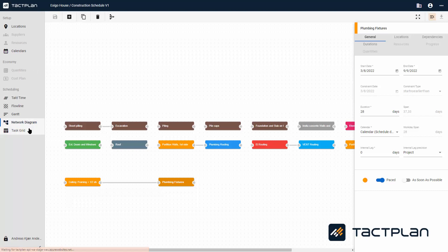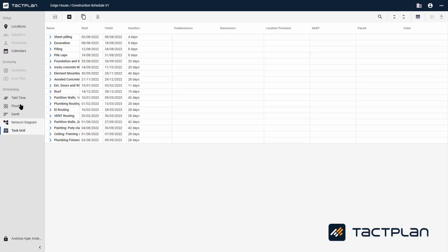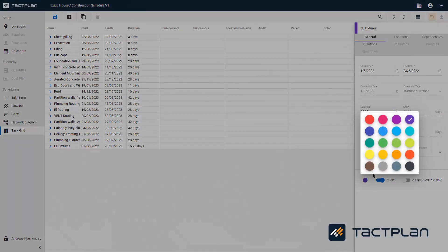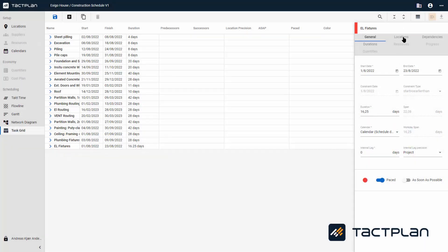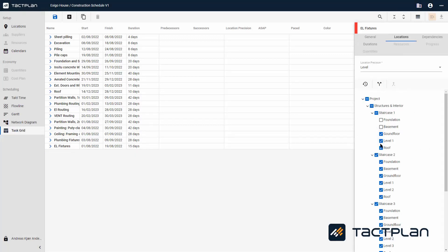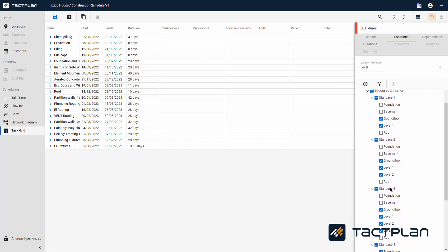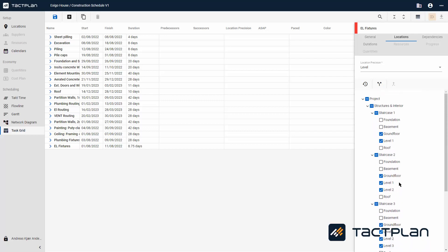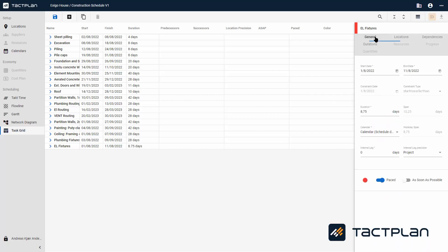We now go to Task Grid. Task Grid is a table view of your whole schedule. Here you can also add tasks. To add a task in the Task Grid, click Add Task. The task shows alongside with the side menu where you type in the name and also choose the color. The task shows at all locations, and just like the other views, you can deselect the locations where the task is not to be made. Then you go back to General and finally type in the duration. Click Save. These were the different ways you can create tasks in the different schedule views — which method you use depends on the visual project.